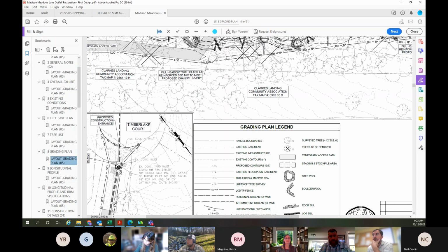Part of the issue of going across Brock's property and his neighboring property was the septic fields. The route that we chose has the least impacts to private property, in addition to staying within our easement and on county park authority property. That's really the route we chose. Also, due to the existing condition of that channel in the park near the playground, we were going to need to be in there working anyways. So it was the most logical place to reduce impacts to private property.